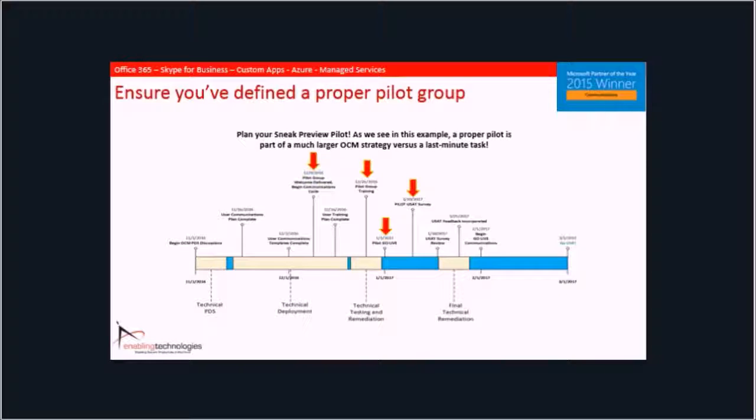What you'll see, though, across the top there are all of the associated change management activities that need to be happening in sync, right? So you'll see where we have our welcome letter going out there. It's kind of the top left side. What is that? A month and a half prior to the final technical remediation. We start distributing those weekly or biweekly communications. We work them through training. Then we move them into the pilot. And all too often what we see out there is, hey, the pilot's starting next Wednesday, it's Friday, we probably better get an email out to them and let them know it's coming.